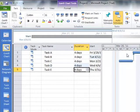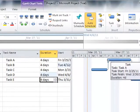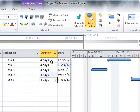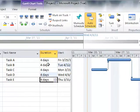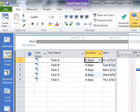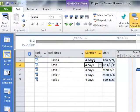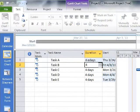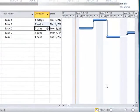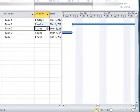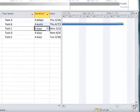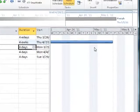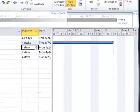Let's set these all to 4 days. This Task A, which starts on Friday, is going to end the next Wednesday because we have 4 working days. This doesn't just include calendar days. We have the standard calendar that says we don't work on Saturday and Sunday. We can override that. We can say 4 elapsed days, or E days, and then we will ignore those non-working times on the calendar. You can say we want 4 E weeks, and the working time will span over those Saturdays and Sundays.